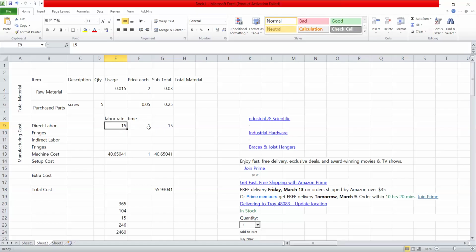All you should know is the machine time, how long it will take to make that bracket. Once you visit one or two suppliers, or if you watch internet videos on YouTube about stamping, after a while you will get an idea by looking at the part that it should take 2 seconds or 3 seconds or 4 seconds. This is the cycle time. You have to put in your guess based on your skills, knowledge, and your supplier visits. And any job you are given, they will offer you a couple of supplier visits to see how they build the part.